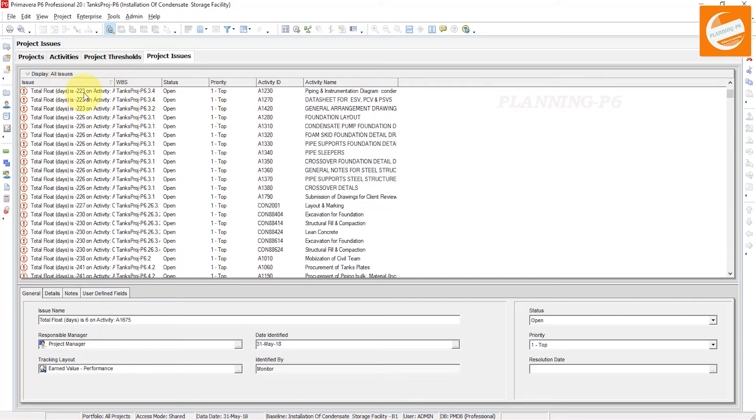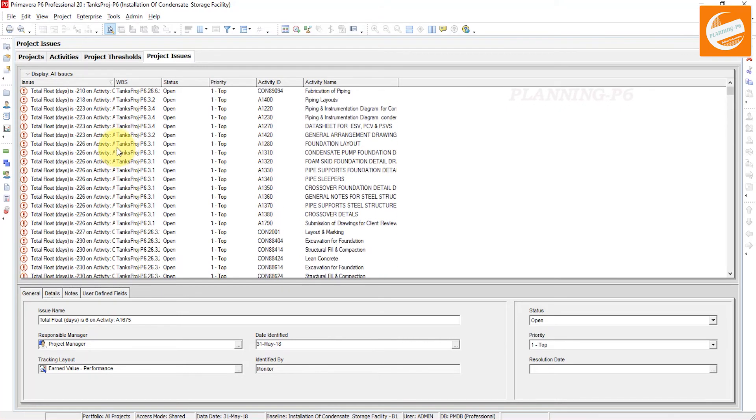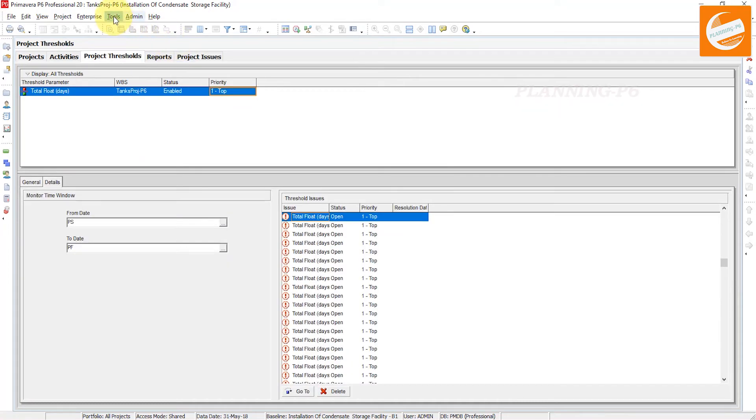Total float days is negative 2.23. What we set as the criteria was 2 to 5 days. Now if the days are negative or positive outside this range, it will be tracked as an issue.